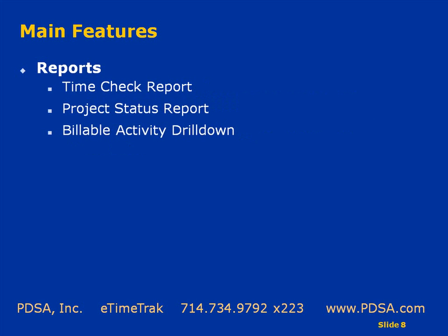We have some reports that come with the system: TimeTrak report, project status report, and billable activity drill down report. And the TimeTrak report allows you to see where people have not placed their time and where they have placed their time. So in case someone's behind in entering their time, you can get after and make sure they get their time in. Project status report allows you to compare actual time spent against an estimate for a task.